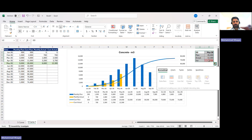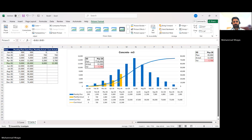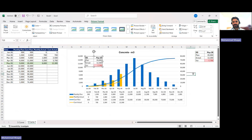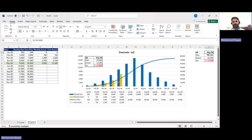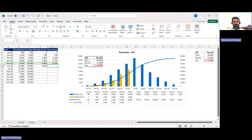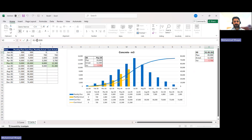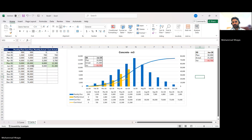Now I use the Camera command again to place the conditionally formatted summary onto the chart. Whenever I change the data date, all numbers update automatically. For example, if I enter June and input 9,000 cubic meters for that month, dragging down updates the cumulative. Changing the data date to June 2026 automatically updates the summary to show cumulative plan and actual for June. Once actual exceeds plan, the variance cell turns green.